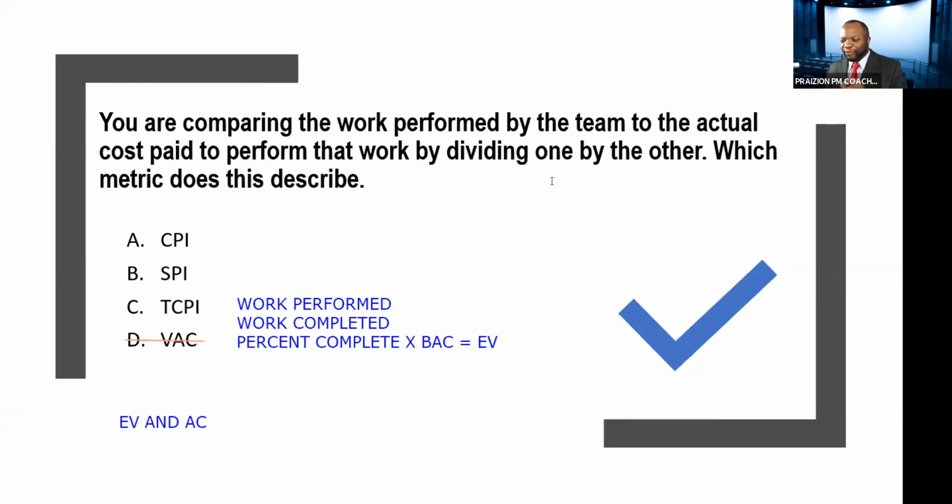B comes before E in the alphabet. Just remember, to be or not to be, BE. So VAC, see, it's good that we're learning some good stuff. BAC minus EAC, all right, that's VAC. So it cannot be VAC.